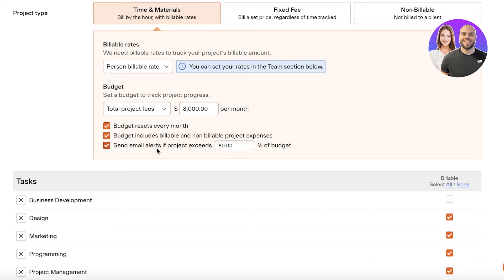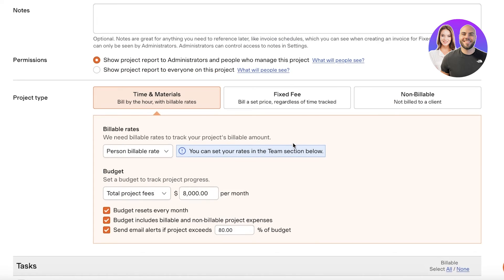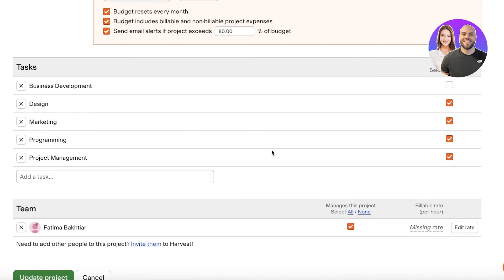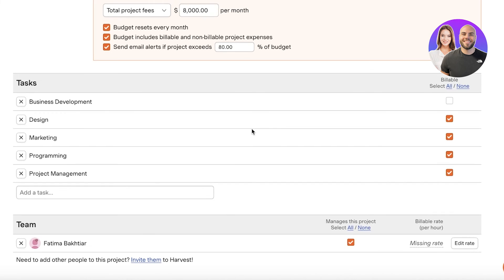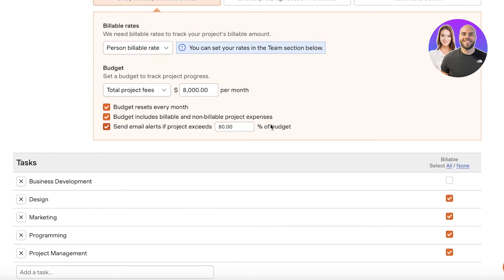And then send email alerts if the project exceeds 80 percent of the budget. So sometimes if you're working on a project you might end up working more hard even though the budget is limited. So that is why you do require to have alerts set in.